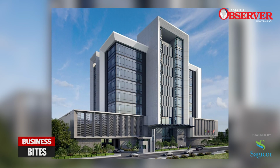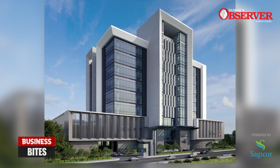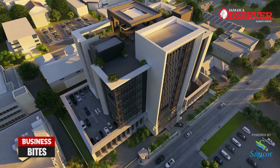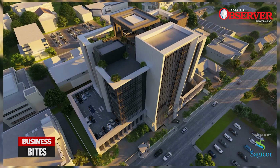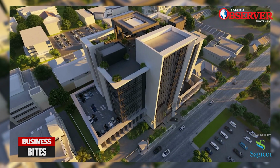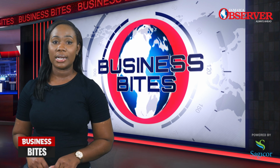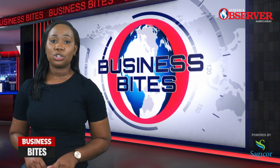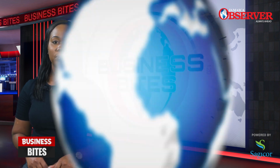This project is a commercial joint venture with Cygnus holding a 70% stake, with the remaining 30% belonging to the Tavares-Finson family. Initially targeted for completion in April 2023, it was subsequently postponed to September 2023, and now the practical completion date is set for the year end. According to Mr. Cummings, the delay was primarily due to construction risk associated with challenges in the supply chain.